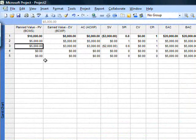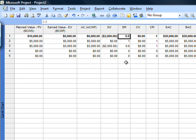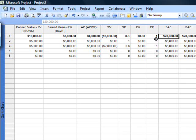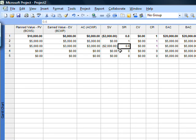So these numbers look straightforward. What you're looking for is across the top of the project — the general health of the project: 0.8. I'm tracking at 80% efficiency in my schedule and in my consumption of expected costs. The estimate at completion is not really a useful number in this case because my costs are tracking with my labor one-to-one. But suppose this item is on my critical path — and in this case it is — and it's 0.6. It's having a great effect. If I can detect low performance indices on critical items, we just focus there.